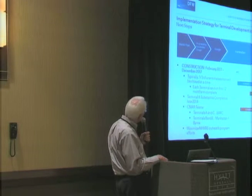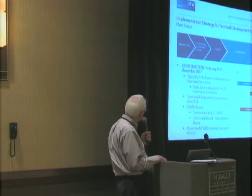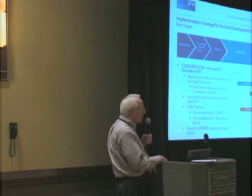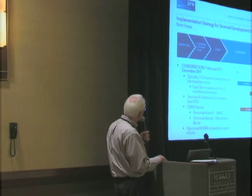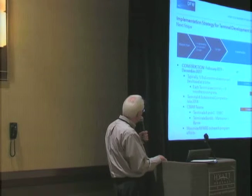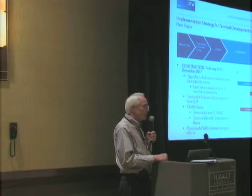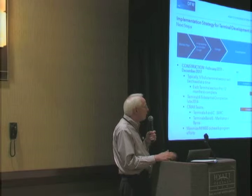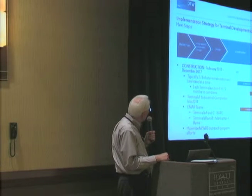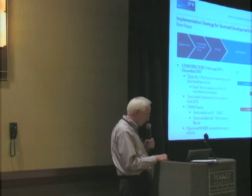As you can see on the schedule right now, we're anticipating that Terminal A will begin first. It'll be starting in February of '11, right after the Super Bowl, and it's scheduled to run for approximately 3 years. It'll be opening in 2014. Shortly after Terminal A starts, we're going to be starting work on Terminal E, and then after another 6 months or so after E, we'll start Terminal B, and then Terminal C will start once Terminal A is complete and open. So A and C run in order, and B and E overlap. So the overall duration of the program right now looks to be wrapping up around 2017, when all the terminals will be complete and open.